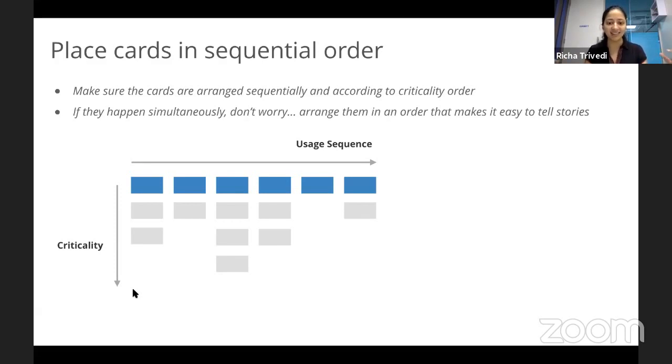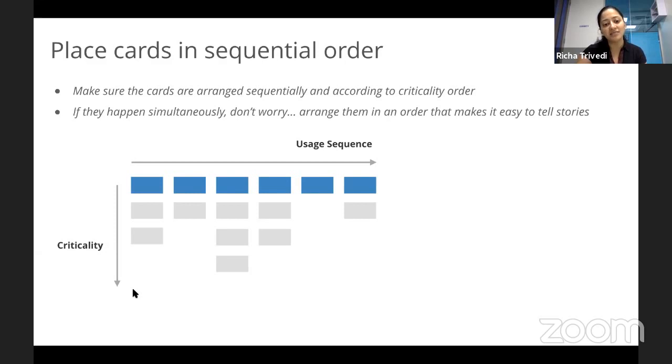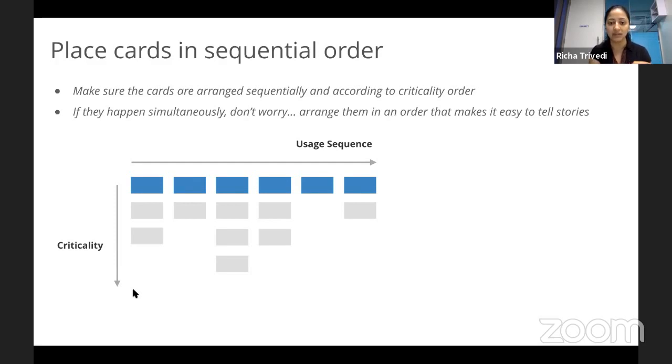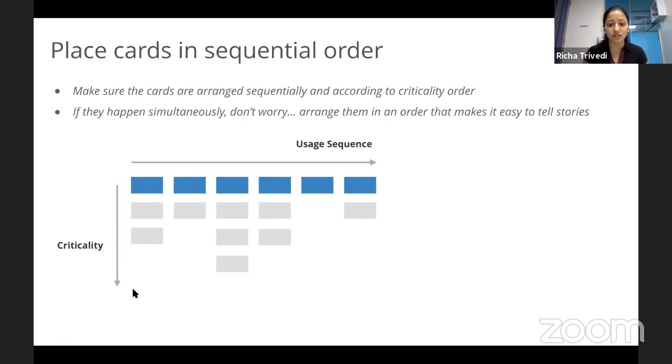Keep in mind, narrating stories is extremely important. And story map is just a tool which is making it easier for us to do that. Align the tasks in the manner of criticality, like prioritize them. For this particular persona, which is the most critical task that I need to do that will help me complete an activity and hence make me achieve the goal. Ask yourself that question, just arrange it in the order. If you're going into an existing project or a new project, doesn't matter. It's good to do it with your team and stakeholders together so that you're all on the same page.